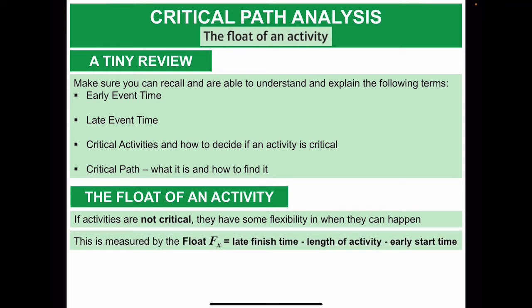The float is found when you subtract the length of the activity and the early start time from the late finish time. That means late time minus the length of activity minus the early time will give you the float.